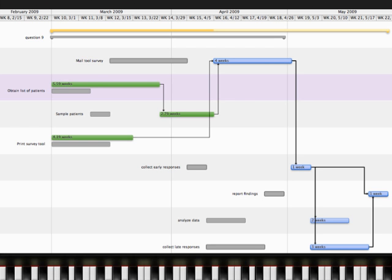This is a Gantt chart of the project. Notice the critical path is in the bolded arrows. Also, notice the green activities — these are the activities that have been fully completed. The gray boxes represent the planned duration. Notice that they occur much sooner on the timeline than the blue activities. The blue activities are the adjusted expected duration times. At the top, the yellow band shows the entire project; it is about halfway filled in, depicting that the project is only 50% complete.